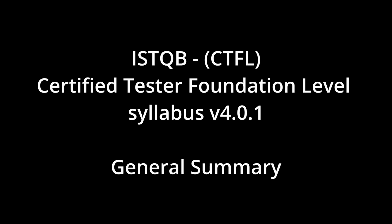What's involved in completion? It involves collecting and finalizing all the data from the completed activities, archiving the testware, plans, cases, results, logs, consolidating lessons learned, which is crucial input for retrospectives and future projects, and usually creating a final test summary or completion report. It's about wrapping things up formally.